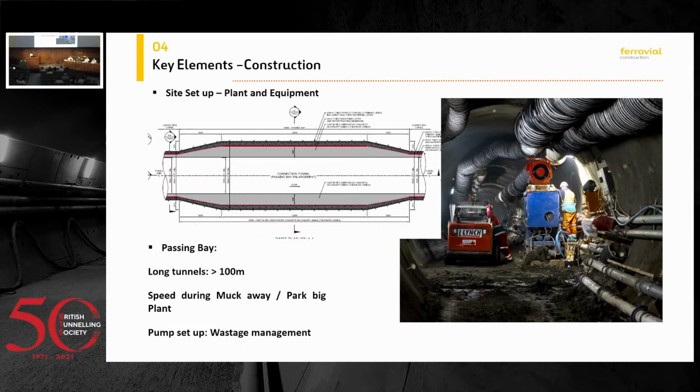We haven't done it because in the end the line was good, so we had enough pressure from the pump to pump up to the face, but we were struggling in Falconbrook, which is 238 meters to pump into the face. So the idea was, if you need it, you need to set up a pump. You pump from the top, around 70 meters up to the pit bottom, then from there to the pump, and then from the pump, pump again to the face. As I said, we didn't need it, but it was set up for that.